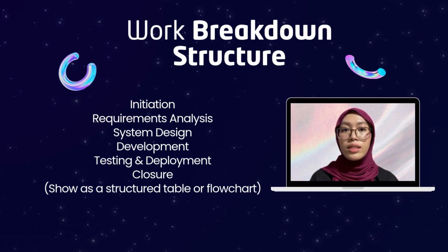Development is where the system comes to life. We build the front-end interface and back-end logic, integrate the database, and ensure secure login functionality. Unit testing is conducted throughout to catch issues early. Once development is complete, we move into testing and deployment. This includes system-wide testing, user acceptance testing, and final deployment to the live environment. Feedback from pilot users is crucial here.